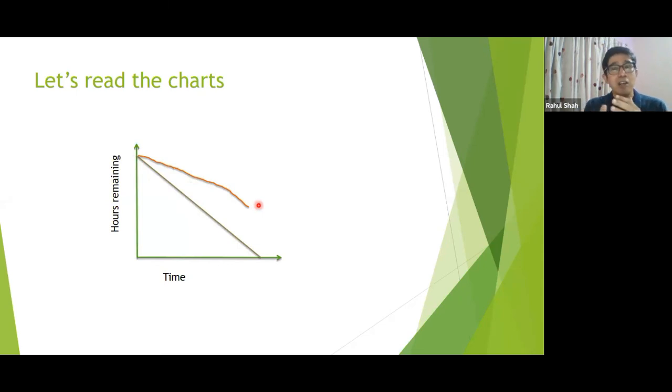So now, are you getting that reading the chart, we say, okay, they won't be able to complete this one. But then we have to figure it out. Some of the members are not available. They are going on emergency leave or pulled out of the project, pulled out of this team. That's why they are not able to complete. So there are so many possibilities on this one. Reading the chart and reading between the lines. This is a very interesting topic if you learn. Okay, next one.